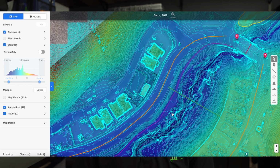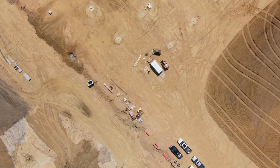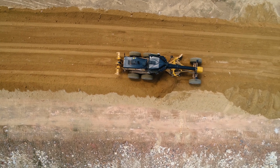Today, earthworks companies are using drones to perform pre-construction site surveys. This lets them validate true project costs ahead of time and ensures that all team members have all the information they need before any dirt is moved. So the first flight is the baseline of topography for the entire site, and then once work is started, regular flights every few days or weeks are used to compare cut and fill changes from the baseline or from one flight to another. And yes, I did say days.